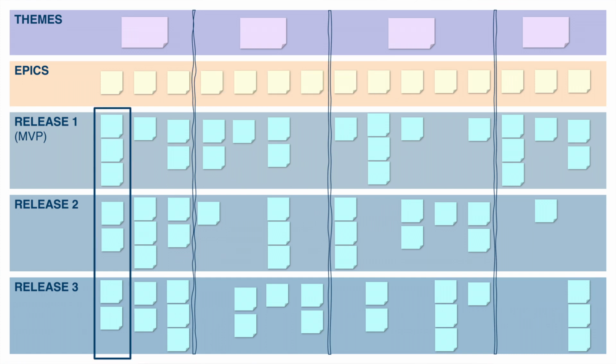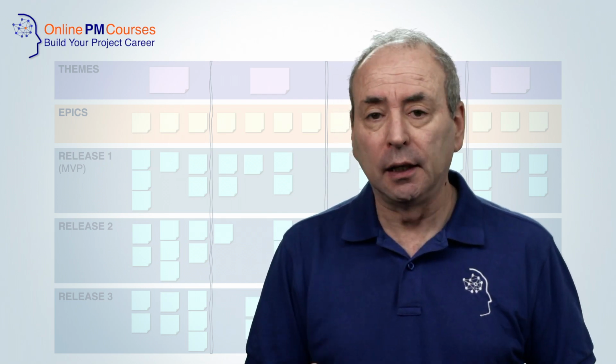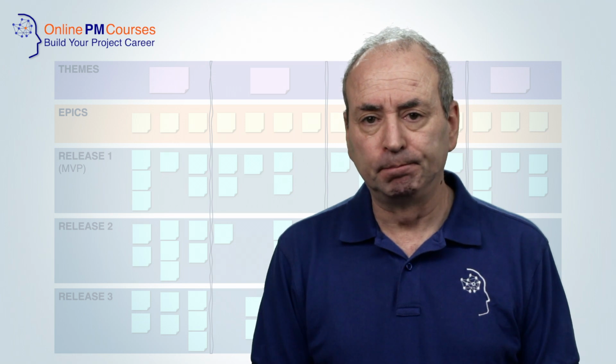Down the vertical axis, we sequence these user stories in the order of the priority that they have for us, and therefore the sequence in which we'll develop them. Those nearer the top we'll develop first, and those at the bottom we'll develop last, if at all. The priority can represent how fundamental they are, how much value they give, how complex they will be to develop, or how sophisticated the development methods and processes are likely to be when we come to develop them.